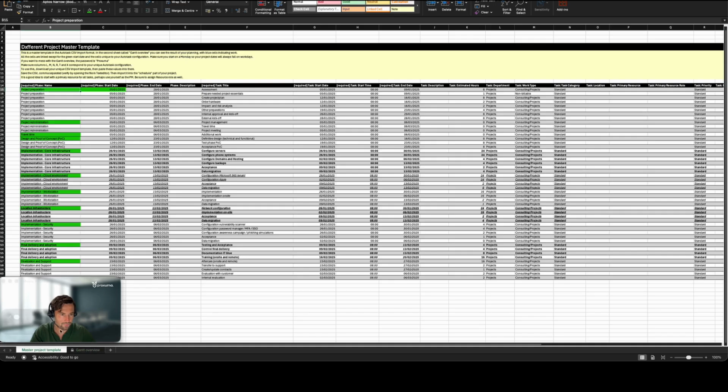All right, so here is where you can edit the project, and really the green fields are for you to edit. So this is the start date. Put this on a Monday, and the project will always end up being on work days, not weekends. You can also change the names, and then only change from the green because these all take over the top cell.